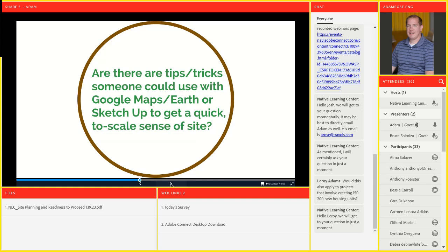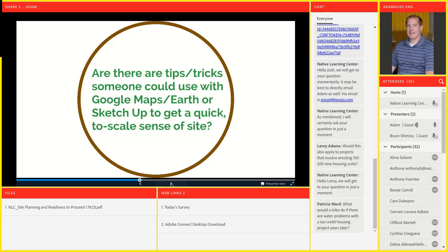On that site, they started writing down all of the risks in the margin. Then they would start drawing utility line information that they got from the utility company. They had a conversation about information they received about fire hydrant location, and they would literally just draw it on the wall on this big giant sheet of paper. It gave everyone in the room the ability to say, oh, so-and-so talked to so-and-so, so it started this running list, and it became basically a visual database of the site.